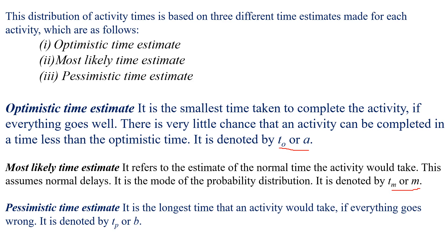The last one is the pessimistic time estimate. It is the longest time that an activity would take if everything goes wrong. It is denoted by Tp or B.